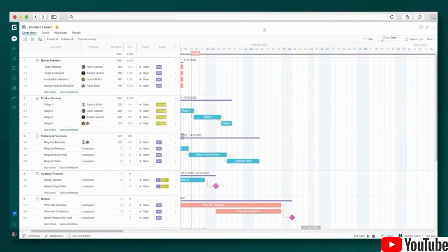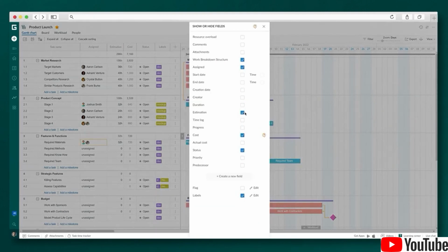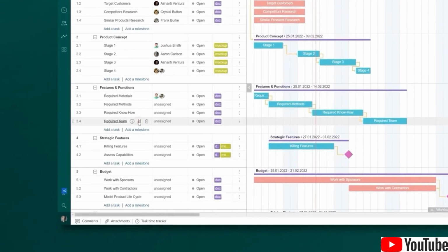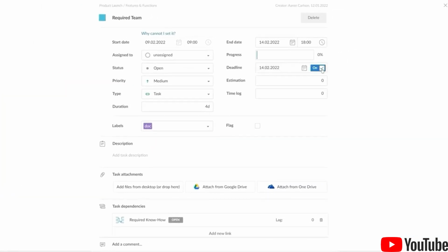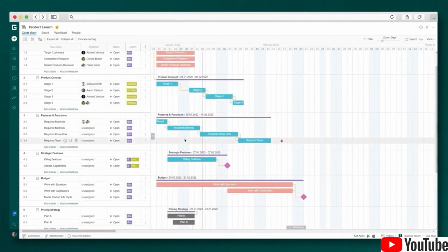When working on any project, we face a lot of risks. Overdue tasks, rising costs, and missed deadlines are just a few of them. With GanttPRO, you can identify project risks before they occur. To avoid overdue tasks, let's set up deadlines. Open the task settings and set a deadline. Now, in the case that a completion date is shifted, you will know in advance about the risk of not completing the task on time at the updated completion date.